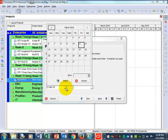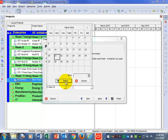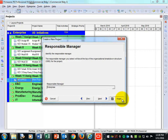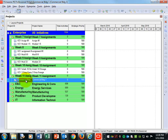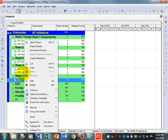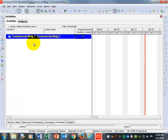For the start date, I'm going to bump it up to Monday the 21st. As long as you're using the next Monday when you're taking this class, that will work fine. Hit Next, leave the Must Finish By blank, and then hit Finish. You'll notice it put a project folder underneath the EPS of Week 11 for Commercial Building. Now right-click on Commercial Building and select Open Project.